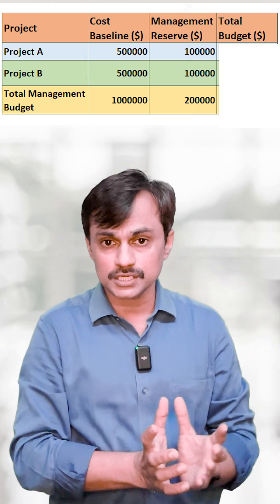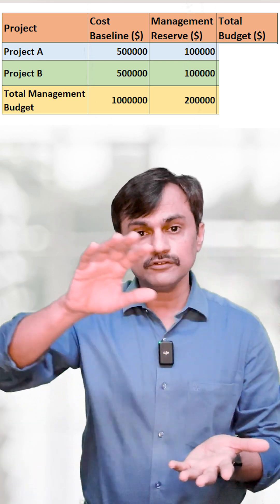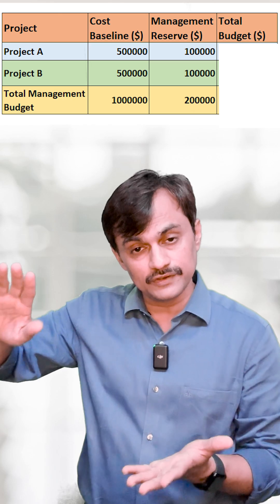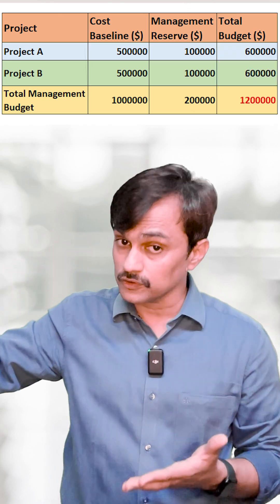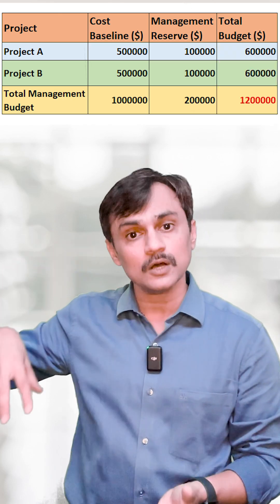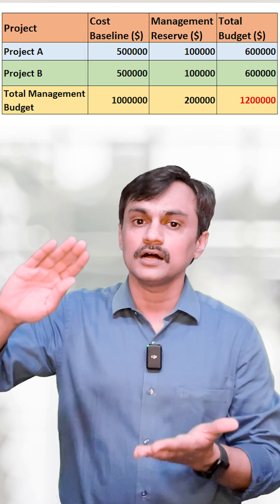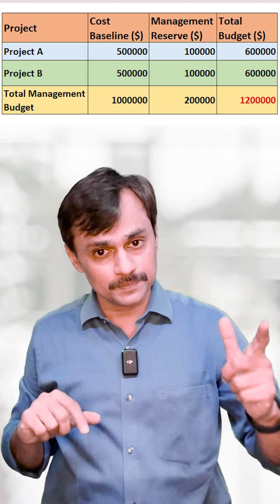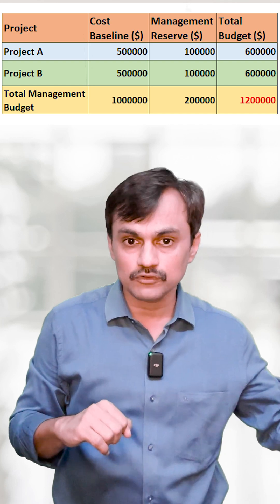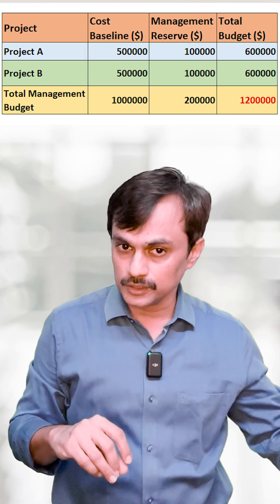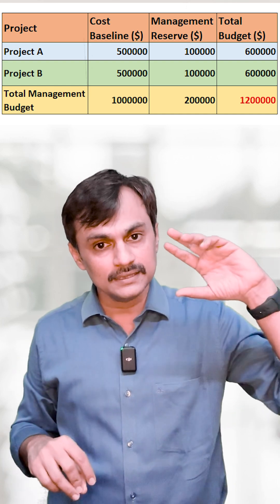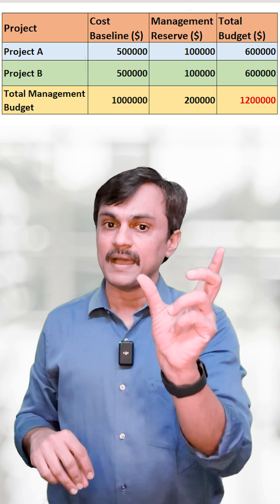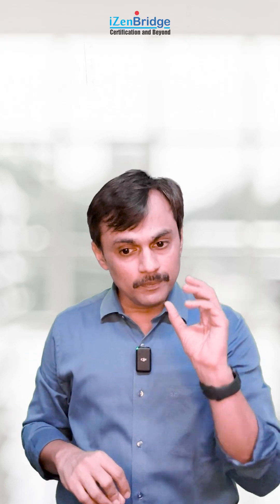When I'm doing portfolio-level budgeting, when I'm looking at an organization-level budget allocation, from an organization perspective for a project we have allocated $600,000, not $500,000 — because $500,000 is the cost baseline and $100,000 I have kept as management reserve. When we use the word 'project budget,' it is from the perspective of the portfolio and the perspective of sponsors, and that project budget includes management reserve.